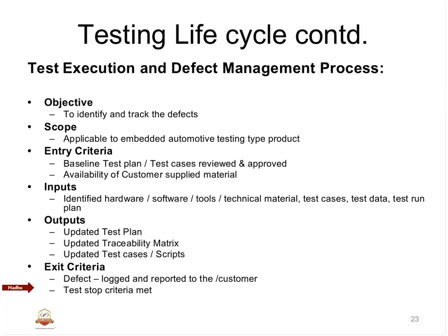That means these are samples which the testing team has to consider, or based on the sampling that is defined in the test plan, as per the test plan. So we will take a call. Our testing team will take a call either to stop the test, or start the test, or continue the test. So this is a very important aspect of testing, that is called tollgate.